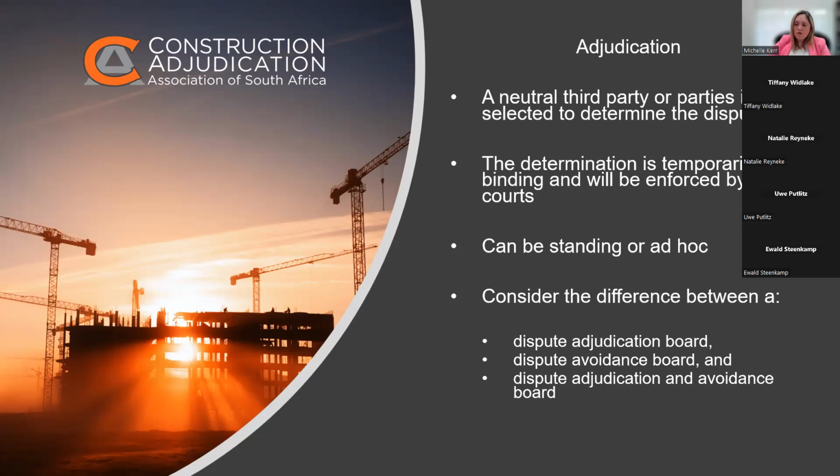So they will usually have additional responsibilities as a standing adjudicator or adjudication board, where they'll come to site every so often and have a certain number of site visits, or they'll review progress reports or meeting minutes, whatever it may be, and keep themselves au fait or familiar with what is going on on site. And they're meant to be there as a sort of preventative measure.